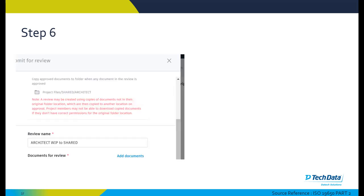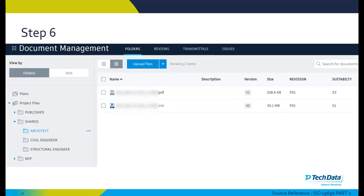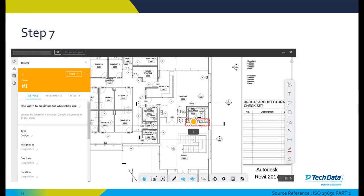The contents of the drawing go through a final completeness and coherency review by the manager of the task team. The drawing is assigned status S3 suitable for review and comment as this drawing is not being issued for coordinating purpose but only for comment. The drawing is shared directly with the lead appointed party. That drawing along with any other supporting information is then reviewed by the lead appointed party to ensure that it complies with the project requirements, and the lead appointed party comments and instructs the task team to update and reissue for authorization. All of this can be captured within BIM 360 using the issues and the markup tools and assigning it to the relevant or responsible role or person.